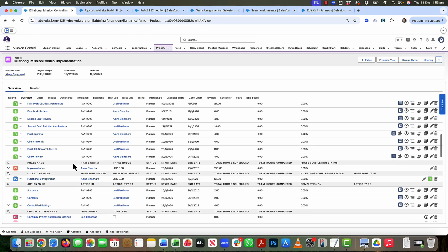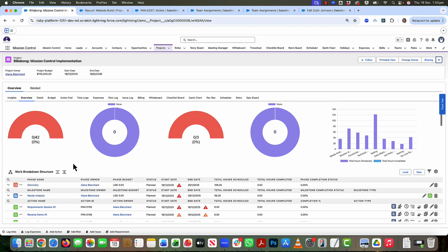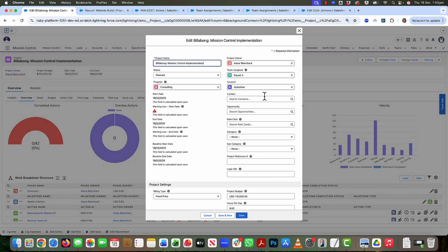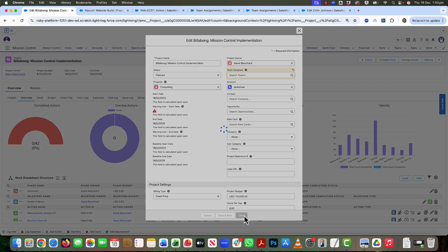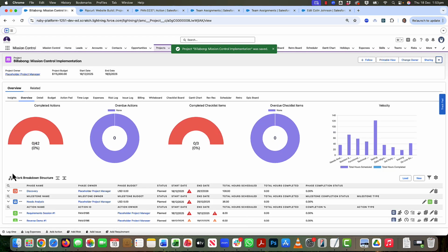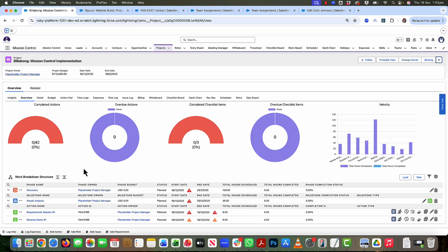So let's say actually I made a mistake. I wasn't ready to assign those. So if I actually want to undo that assignment, I simply come back and remove that field. So anything that was assigned to those named individuals as a result of moving that team, they will get reassigned back to those placeholders. So again, you can see that everything that was assigned to those people has now been set back to that placeholder. That is identified based on their squad placeholder on their individual team assignments.